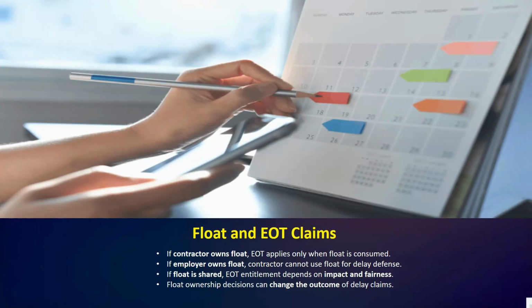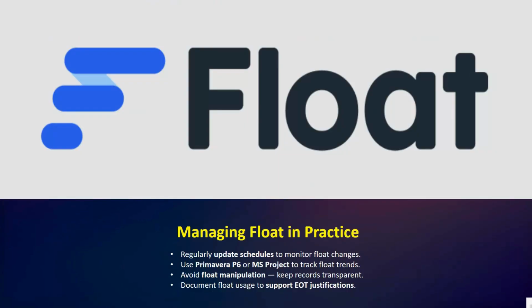Third, if the float is shared, EOT entitlement depends on the fairness principle and the actual project impact. Therefore, understanding and managing float ownership is essential for fair delay analysis and claim evaluation. Okay, so I hope this is clear.